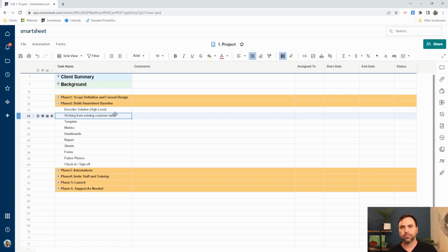Are we going to start with a template? Does Smartsheet, in its Control Center or its Solution Center, have a template that we can work from? Or do I have a template that I've used from prior clients that we can start from and kind of shortcut some of the processes? Because projects typically have the same fields starting out. We've got task name, start date, end date, red, yellow, green, blue indicators, baselines, dependencies, predecessors. We usually have some kind of level column as well to define what level in the hierarchy we're working with.